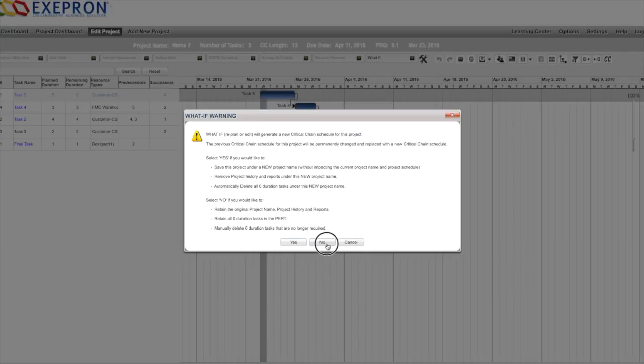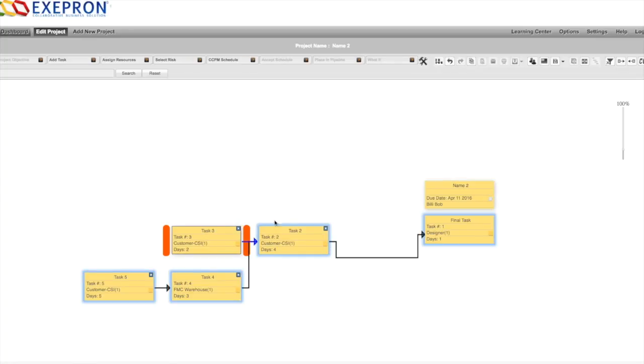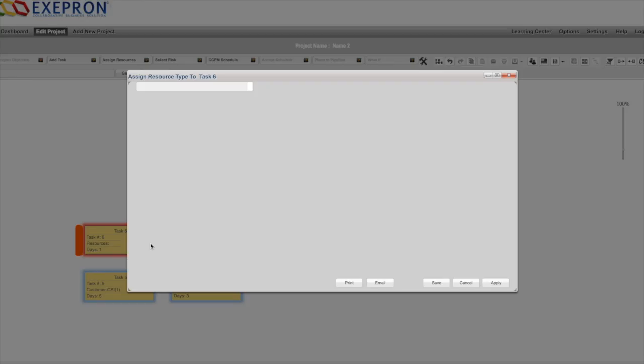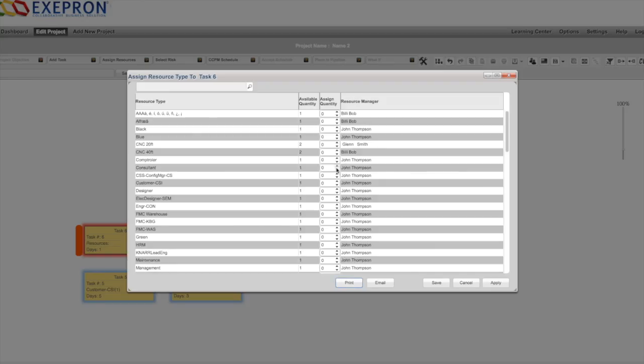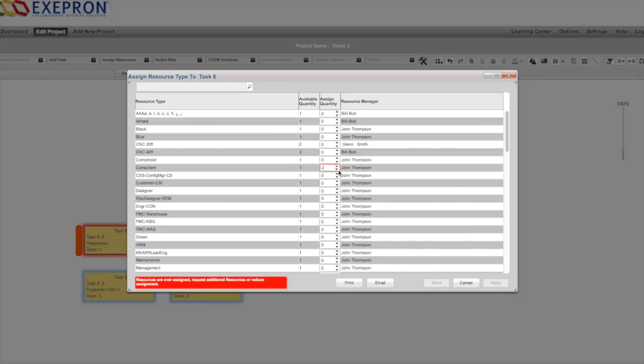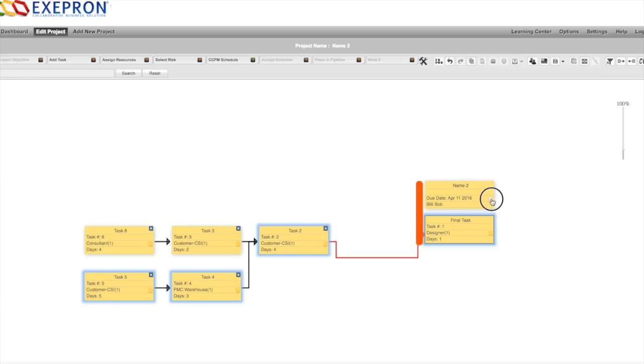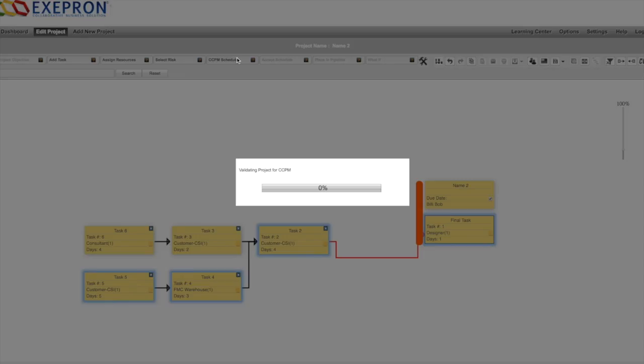You want to retain information and you'll go back to your project. You can add a task, add resource types, add the duration of your new task, click ASAP in this case, and rerun your schedule.